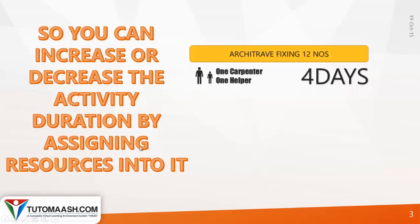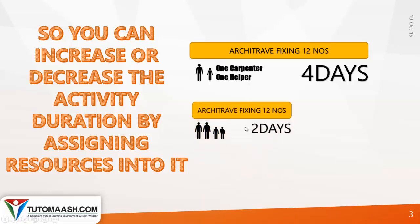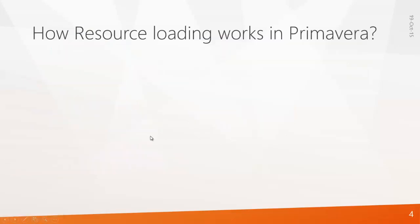For example, let's take an activity: fixing of 12 number of architraves. To do this activity within 4 days, you require 1 carpenter and 1 helper. This is how the productivity of resources depends upon the duration of activities.